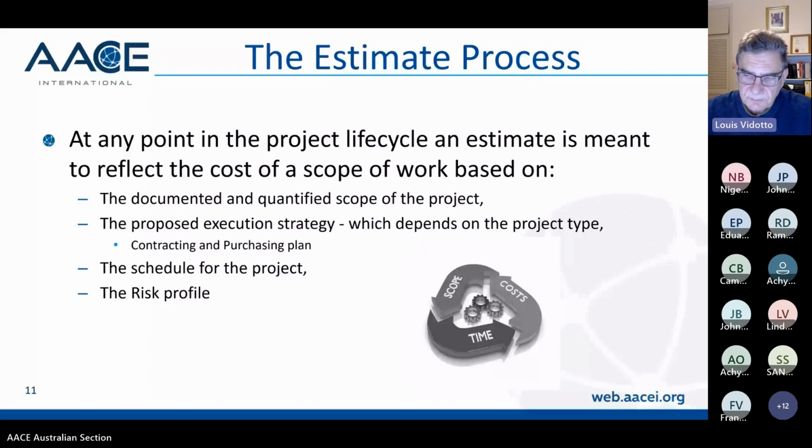Contractors' estimates. When contractors bid scopes of work, they look at the risk profile in the contract. They look at, for example, what's missing off the drawings or the quantity takeoffs, and they'll make their own risk profile as to what their bid needs to be and how they're actually going to make money out of it at the end.